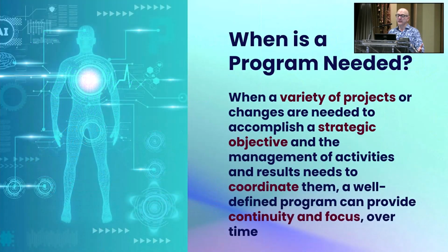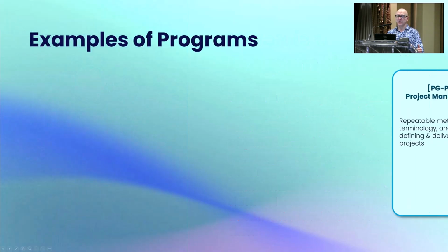So when do we need this stuff? Usually when there's a variety of projects. If it's a one-off thing, move this server from here to here, you don't need a program. But if it's something that's going to involve a lot of resources, several discrete sets of effort, a lot of skill sets, you often need a program to define why we're doing it and keep everybody focused on that vision. And help coordinate all of those so that you get some continuity of skill set from project to project, and you have that intrinsic lessons learned that are then applied to the next project.